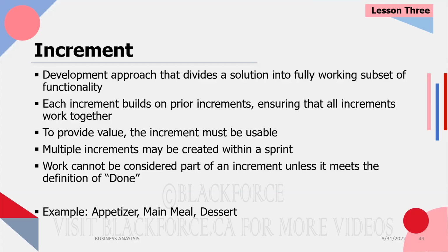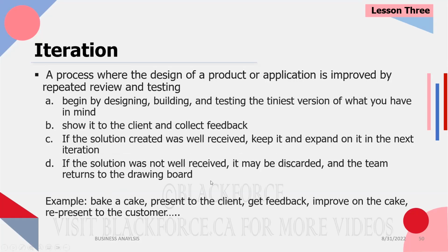That raises the question, how do I know what done is? You need to work with the business to get the definition of done. What does done mean to the business? Ask the business, for this requirement you gave me, which I've documented in this user story, what needs to happen for you to give us a green check mark to say you completed it? That definition of done needs to come from the people who gave you the requirements. Okay?